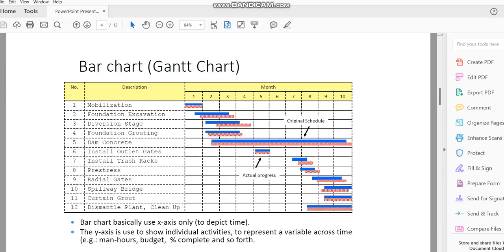You can put weightage according to the pricing, you can put weightage according to the numbers, you can put weightage according to the work, so a quantity of work. Once you've done that, you say, okay, month 1, I finished my mobilization, so that's 100% complete. But if let's say in month 1 you didn't finish all your mobilization, you did not finish until 1.5 months, then the bottom line, you will need to go longer. It will go into the second month or second and a half month. Then excavation, maybe did not start on time because this one is not finished on time, for example.